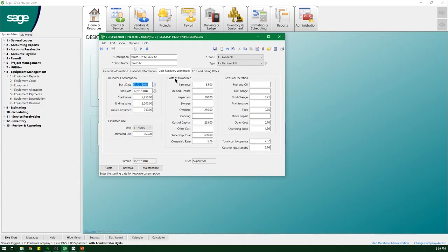And now when I use this on a job site, I push this piece of equipment out to the job for 5 hours. I create an allocation of the equipment to the job, and it transfers that cost out of overhead to job. So you get a real honest look at what that job cost is. Otherwise, you're making your best guess on your overhead. How much did I use it for that?